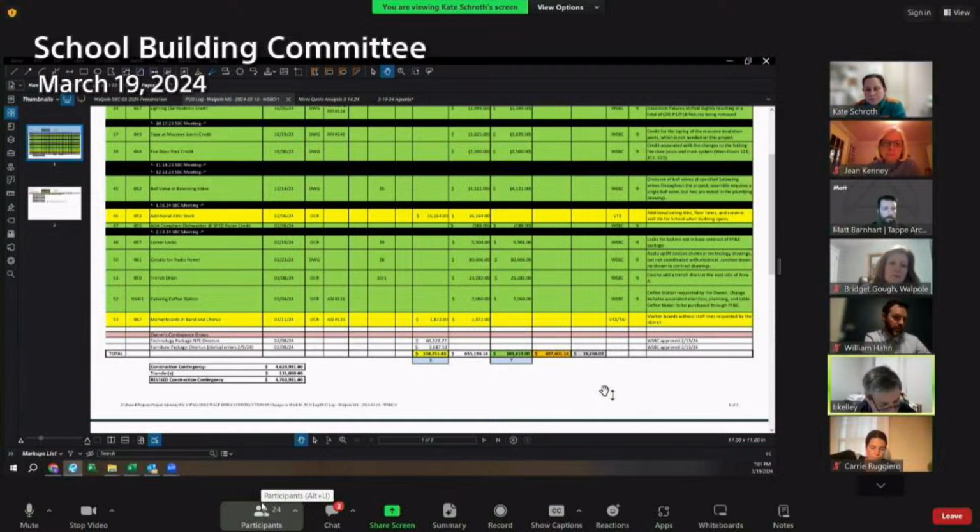And Jack, I know the number looks big on paper, but there's 71 classrooms. So if you break that down 71 times, it's about $1,135 a location. So basically, it's roughly an 8-hour day, one electrician, some materials. So if you break it down per classroom, it's just over $1,000. I know the number seems big. We reviewed it, vetted it. I'm with Matt that if it was shown on the documents, the GMP would have been higher, but I think that's why we have a construction contingency for this type of incident.